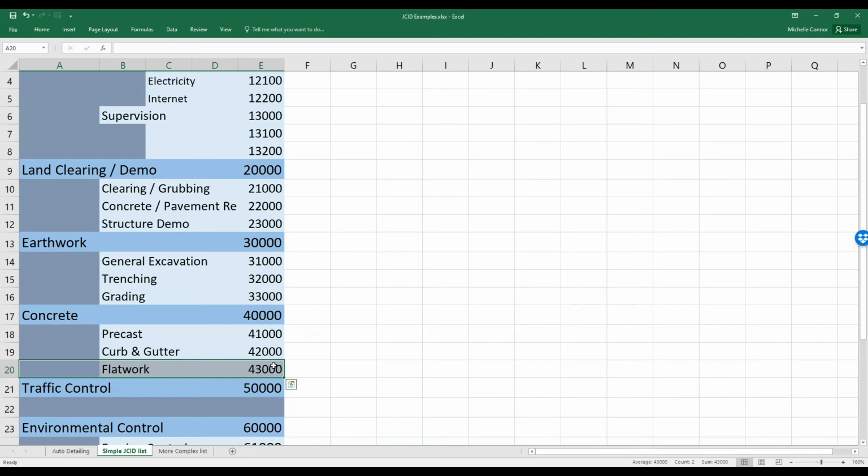Similar to the idea if I'm running conduit and it's 2 inches or it's 3 inches, there's more work of some degree happening for one than the other, and they're technically different materials, but they're not usually a very different process overall. The things that you should be worried about are when does the work change?